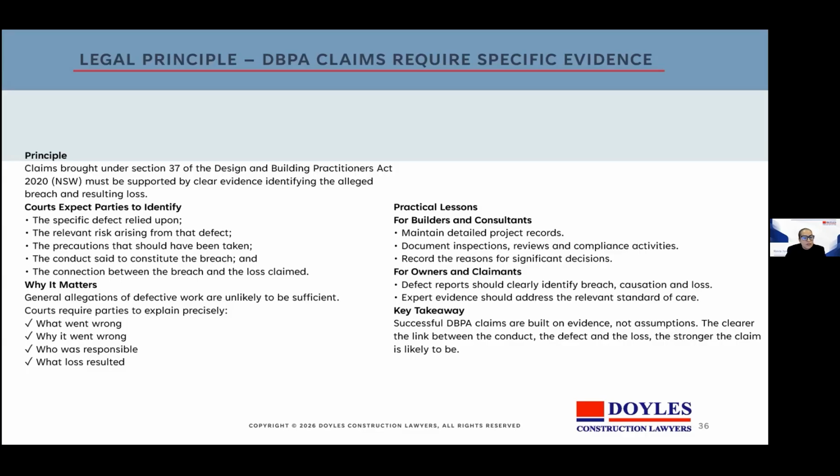Whether prosecuting or defending a claim, the parties must be able to explain what occurred, why it occurred, how the alleged conduct occurred, and how that alleged conduct is said to have caused the loss claimed. Good project records and well-prepared expert evidence remain critical in this process.